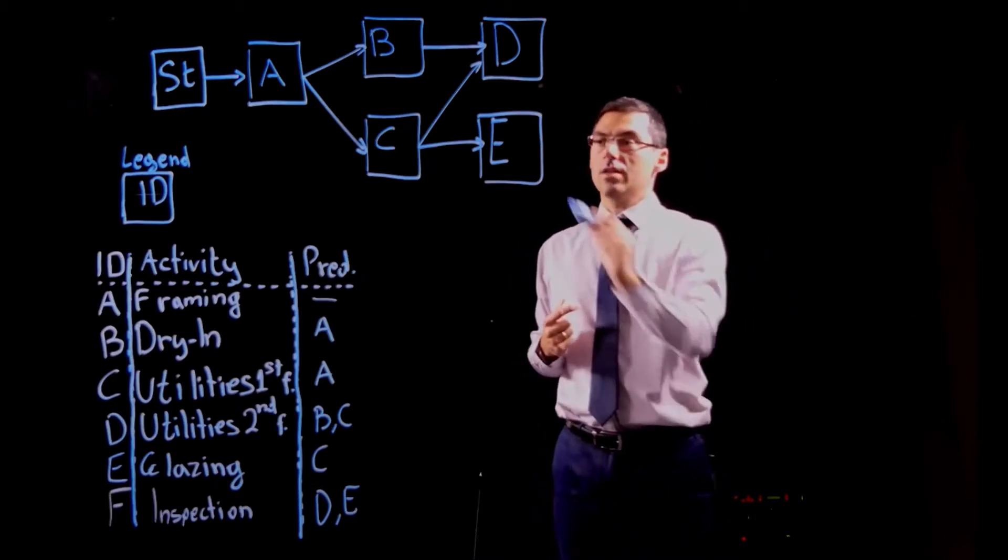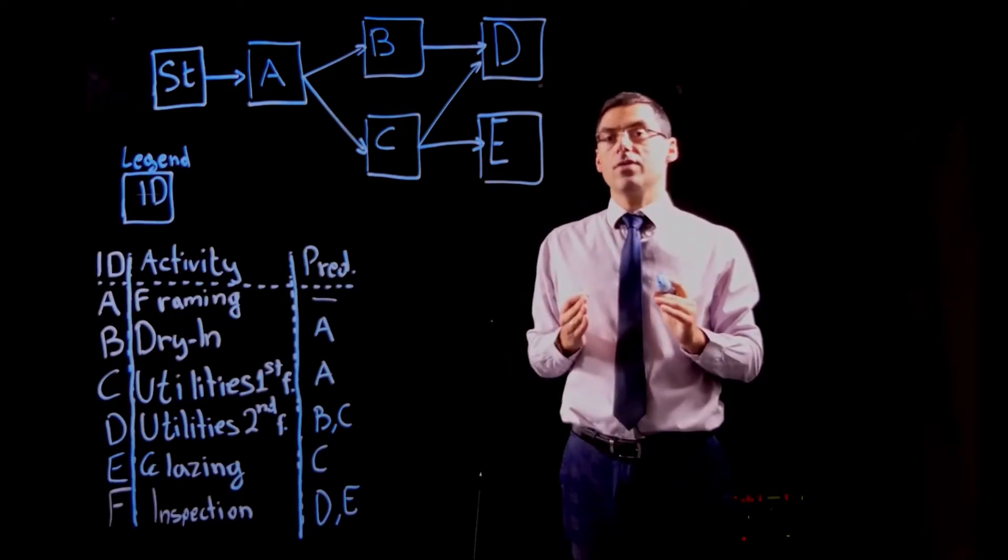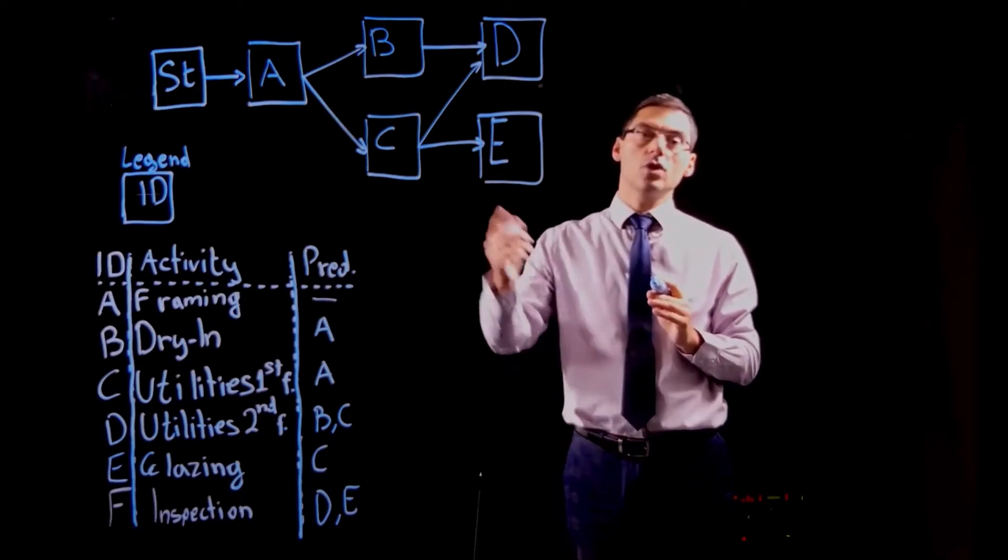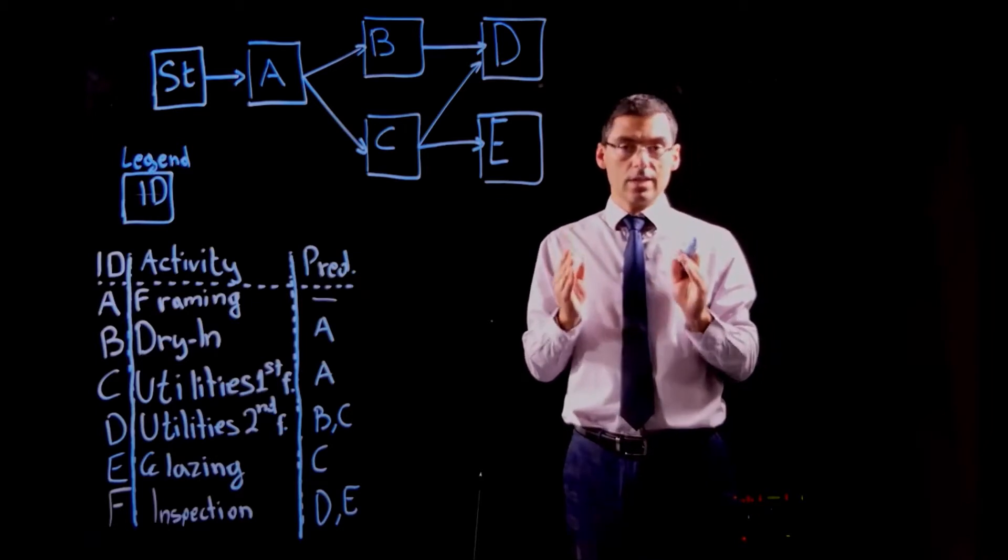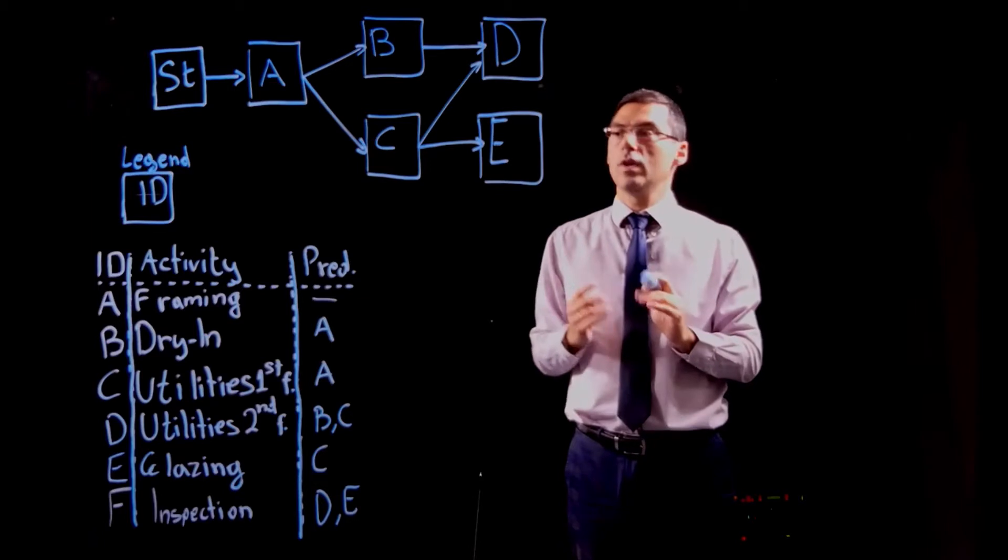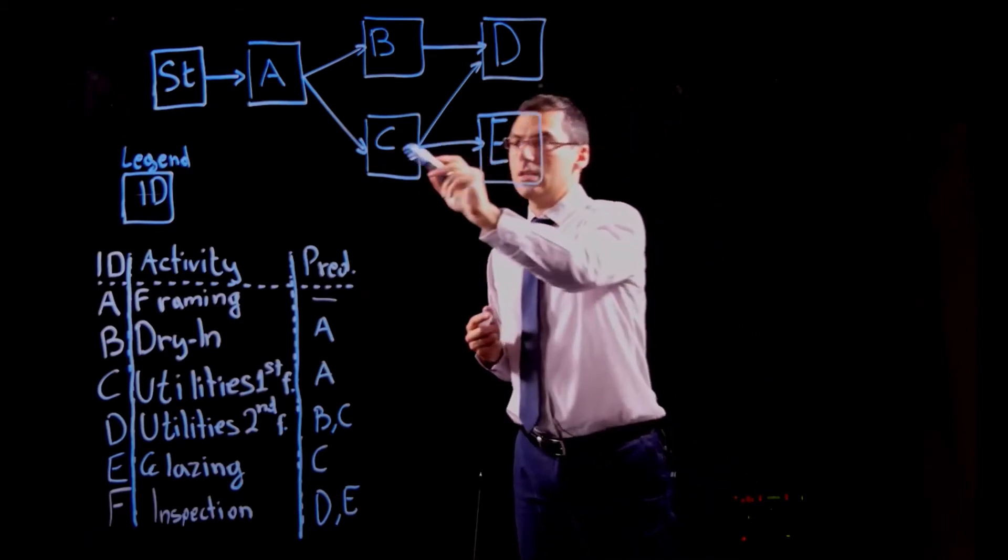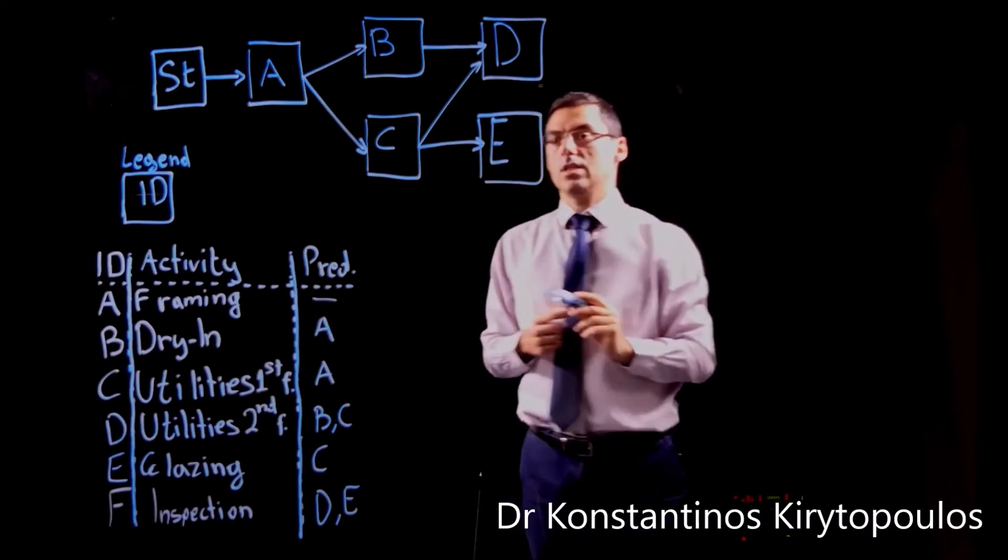However, don't forget that this is what we call a directed graph. A directed graph is a graph that the nodes are not connected by just lines but arrows which show how we move. So you know when you see the arrow that you go from C to E. C is the predecessor, E is the successor activity.